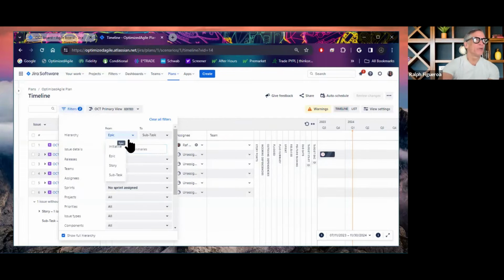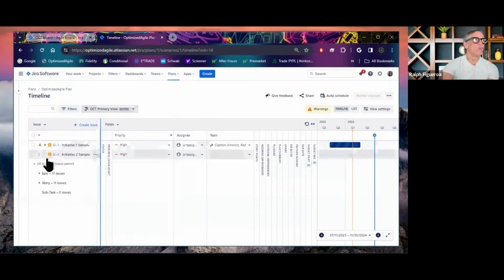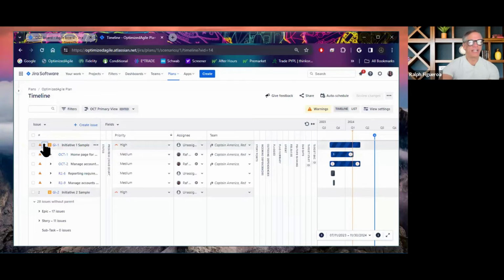Notice that in this project of mine, I have this concept of initiatives. I have worked with organizations that create different custom issue types that live above the custom issue types that you see in Jira. Whether it's a custom issue type called feature, initiatives, themes, concepts, depending on the needs of your organization. If they want to articulate business level goals and objectives that are not really constructs of a release, they live for a longer duration than a release.